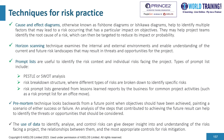Another technique is horizon scanning — a technique that examines the internal and external environments and enables understanding of the current and future risk landscapes that may result in threats and opportunities for the project. Then there is the prompt list, which is useful to identify the risk context and individual risks facing the project.